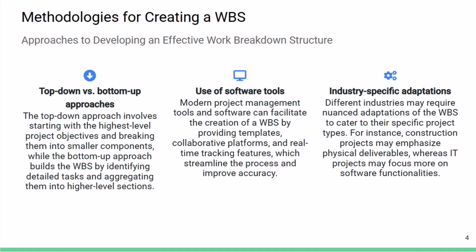So what are the methodologies we can use to create our WBS? We can use top-down or bottom-up approaches. In the top-down approach, we decide on the major deliverables first, then we break them into smaller tasks, then we again divide those smaller tasks into even smaller tasks, until we have manageable tasks that can be completed on a daily or weekly basis, not more than that. We can even use some software.